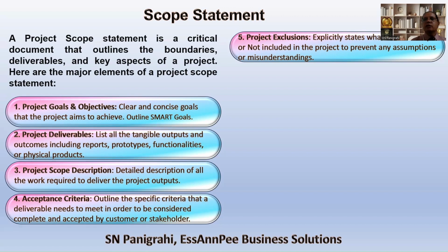That was not mentioned in the contract and the scope of the project. So therefore, the building is constructed as per the plan. But in the contract, the exclusions are not specifically mentioned, but inclusions also are not specifically mentioned. So therefore, if it is not there in the contract, the builder will not do those activities.